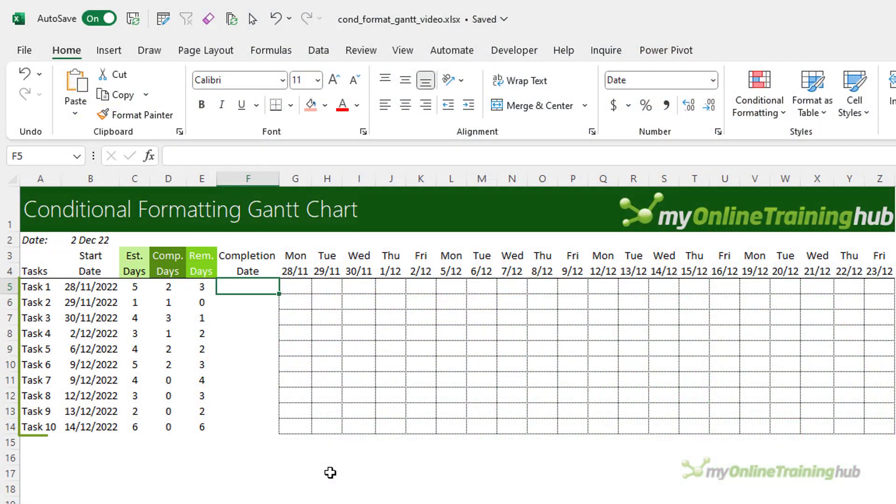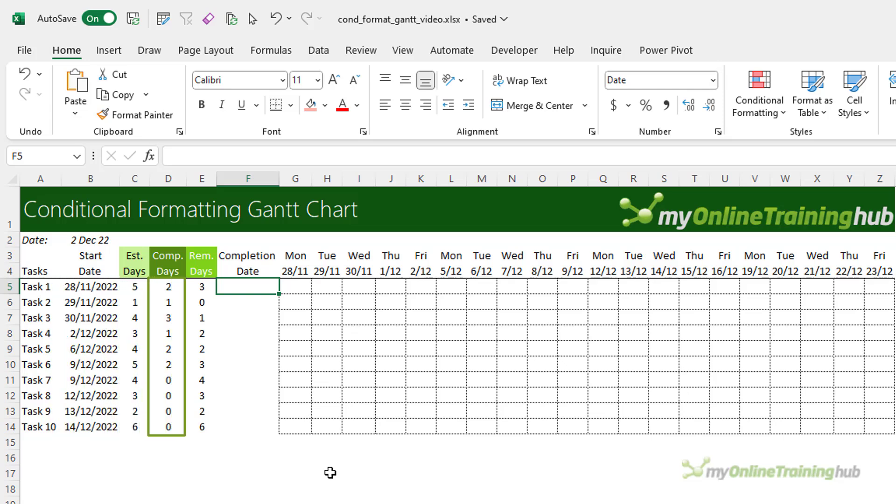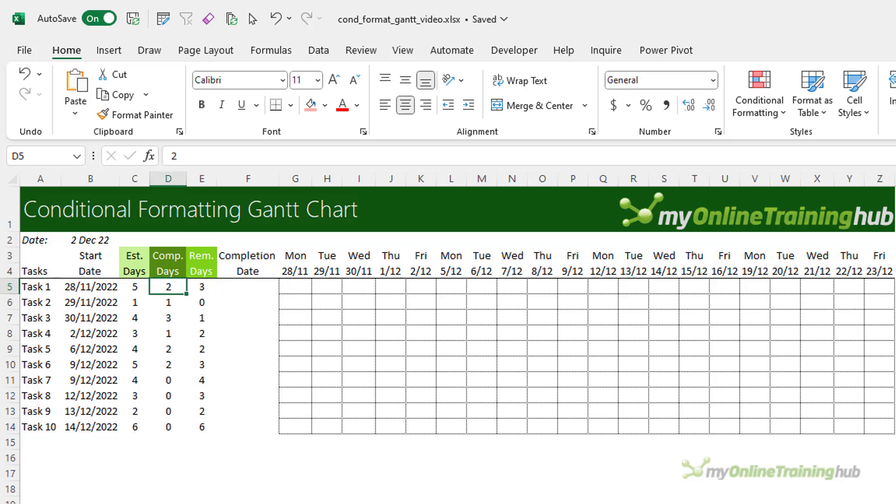Here I have a list of tasks, the start date, estimated duration of the task, the completed days so far, and the remaining days. Now just note that my dates are formatted day, month, year. Now I often get asked, how do you calculate the completed days? And the answer is, well that will be unique to your organization. For example, it might simply be date driven,